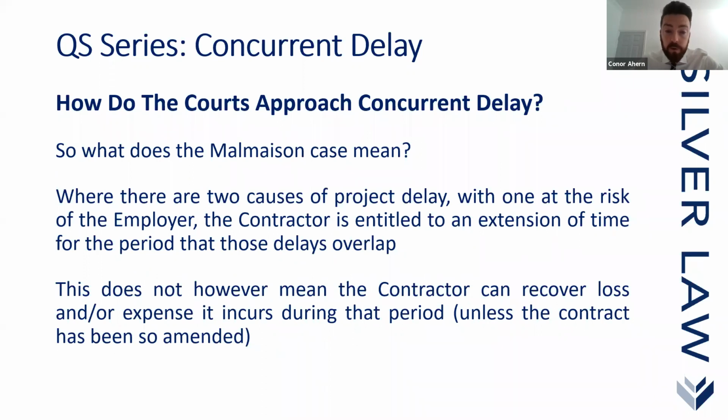This does not, however, mean that the contractor can recover loss and expense that it incurs during this period, unless the contract has been so amended. That's an important point to bear in mind when you are dealing with delay and concurrent delay: relevant events do not automatically become relevant matters also.